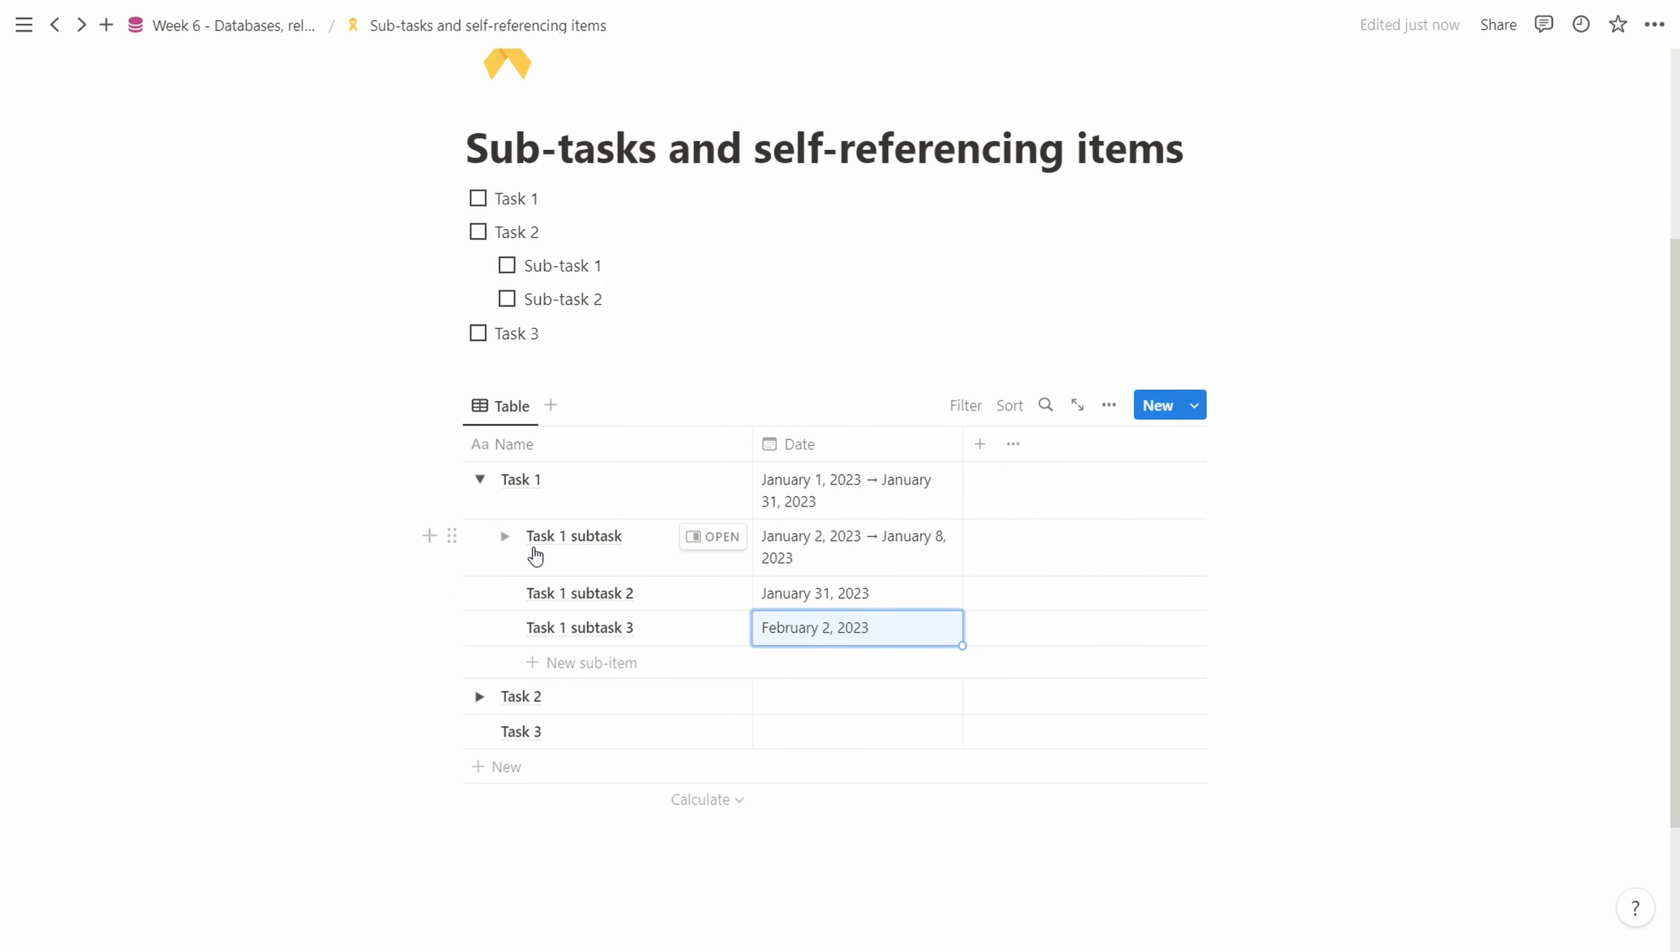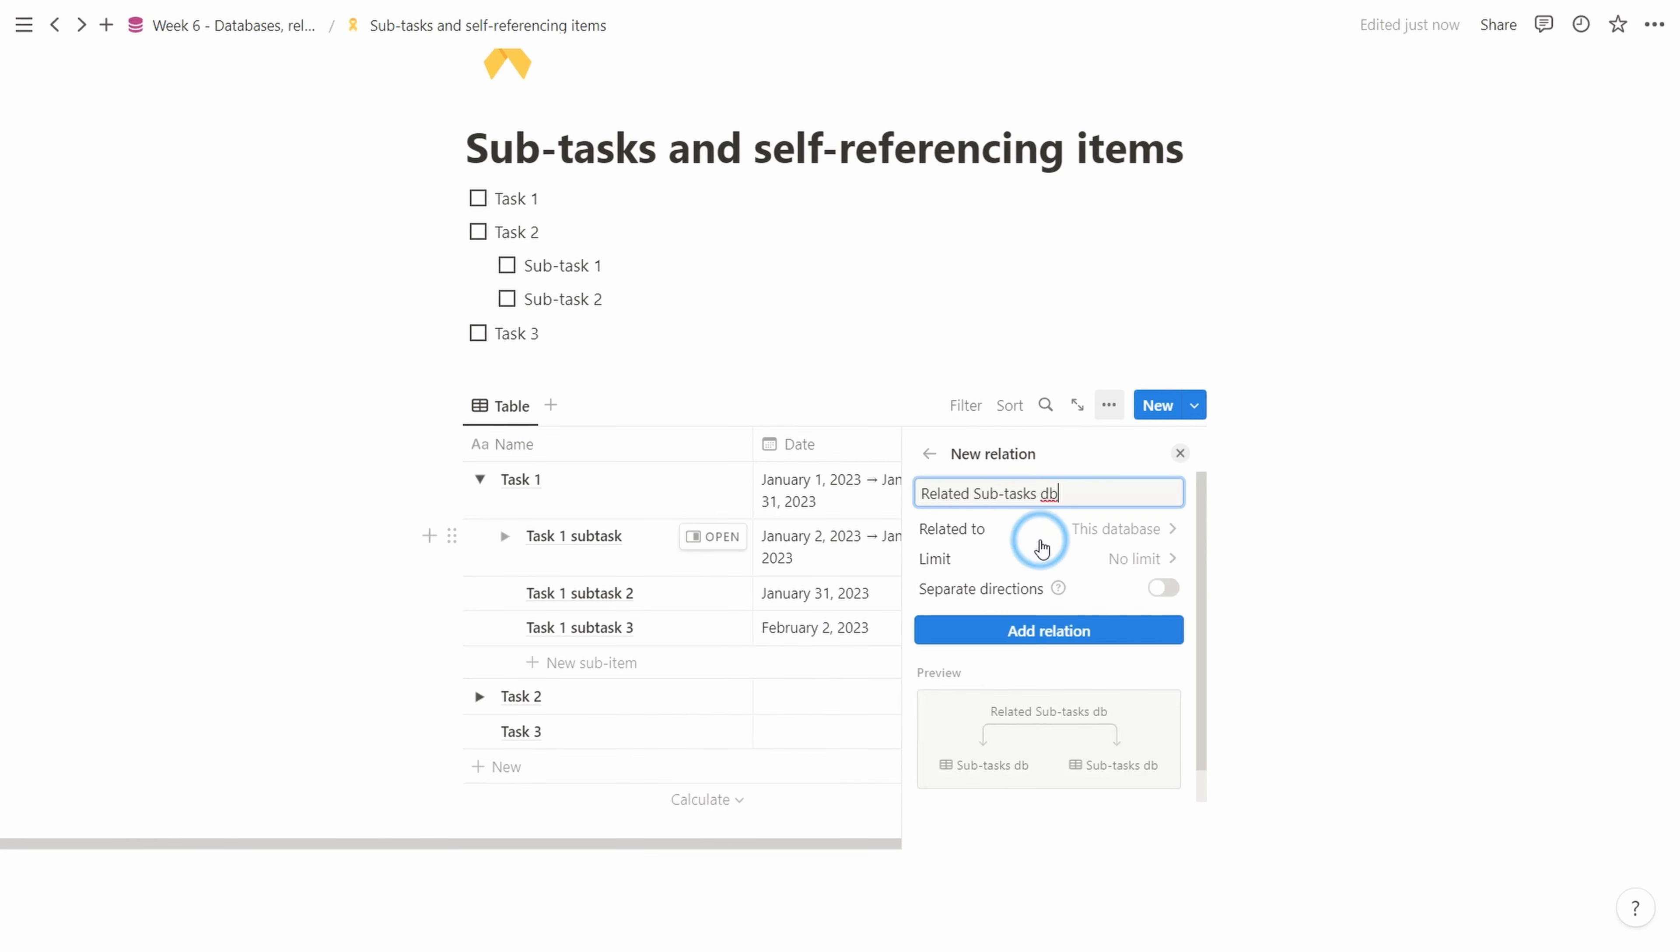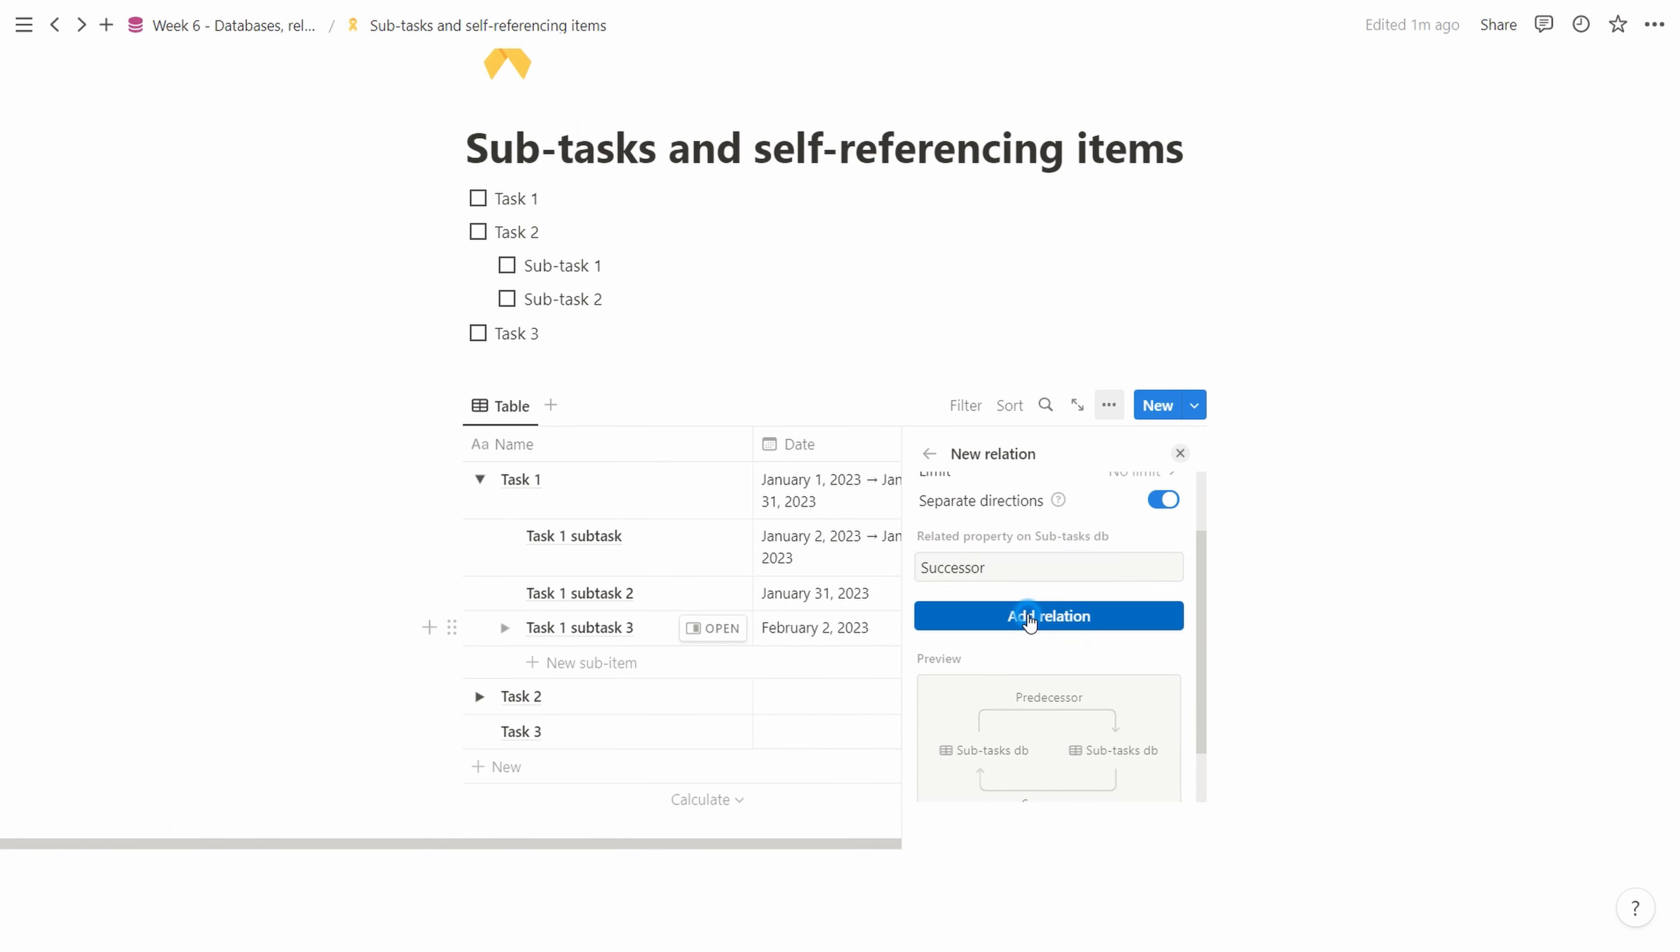Now we're looking at dependencies. The timeline view will be quite nice, but we actually want to say we want to do task 1 first, task 2, and task 3. So let's create a new relationship property for that. We relate to the same database and call it 'predecessor', meaning this points to a task that needs to be done before this. We add separate directions and call it 'successor' or things to be done afterwards. We add the relationship.